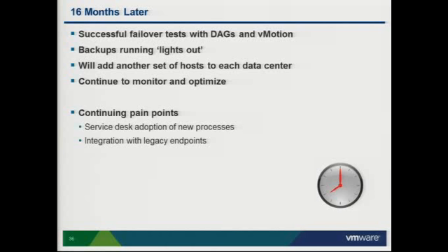And by this I mean things in your environment that are maybe old, that are certainly not going to be compatible with Exchange 2010 right out of the box, perhaps never. Fax connectors, like I said, network copiers, devices that you have out there that interact with SMTP or with mailboxes. They might use Exchange to do lookups to find people to mail items to, or if you're copying something on a network copier, to look up your email address, things of that nature. So just make sure you do, again, like I previously said, part of the due diligence, be very thorough, look at all that stuff in your entire ecosystem and get it all looked at ahead of time.